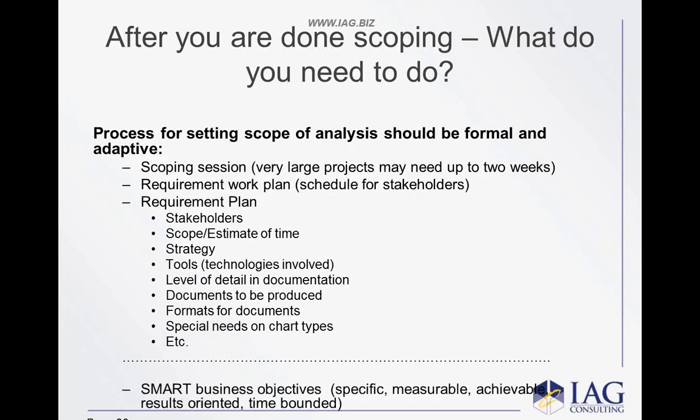They're specific, measurable, achievable, results-oriented, and time-bounded. Objectives measure the achievement of a goal. And goals elaborate the vision of what it is you are trying to achieve. Think about those three layers, and it's going to be very helpful for you to take what they're saying and slot it into one of those three buckets.